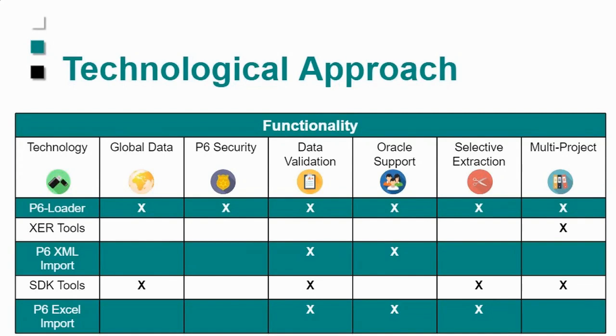So in that example, you have to be very, very careful when you're working with XERs, and you should never just go and manually edit an XER. Now, it does let you get into multiple projects, but because there's a risk of screwing up your data, Oracle doesn't support this approach. So finally, P6-Loader.